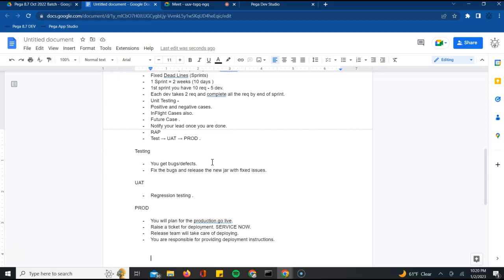Usually the production deployments are done on Saturdays and Sundays. Most of the teams are not available that day, or approvals are not easy to get, because on those days managers are on leave, so you can't get approvals. So it's always good to engage them slightly early in the process.